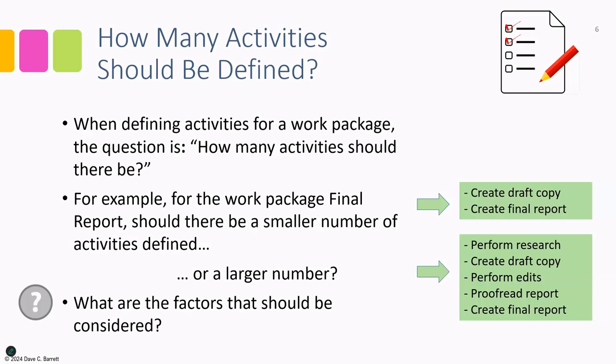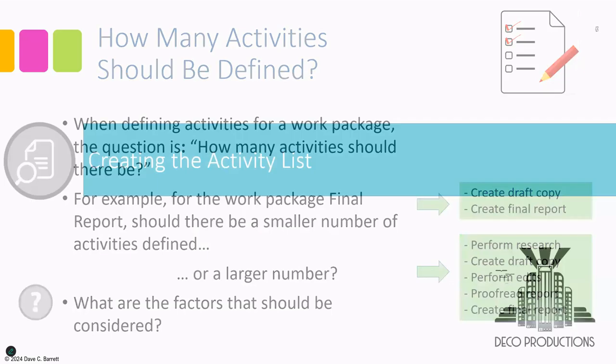As well, the experience level of the person or team that will be working on it. If it is a highly experienced team, you would likely produce fewer activities. If it's a very inexperienced or junior team that requires more direction, you would define more activities.